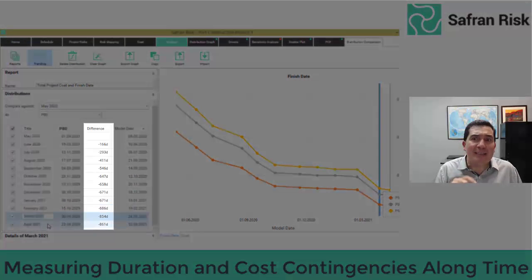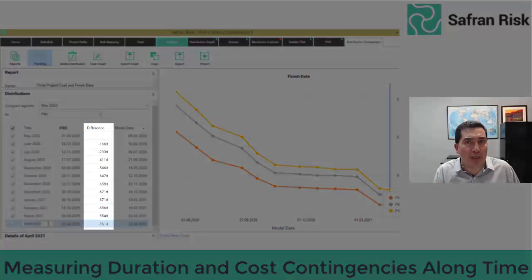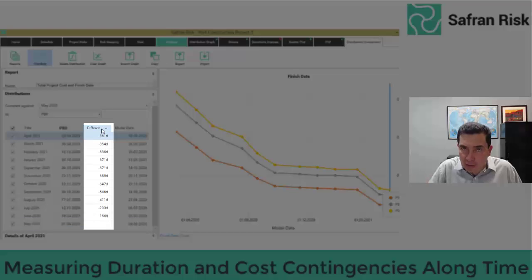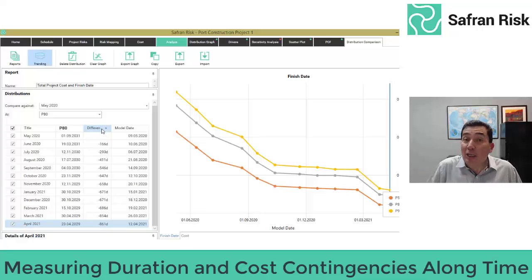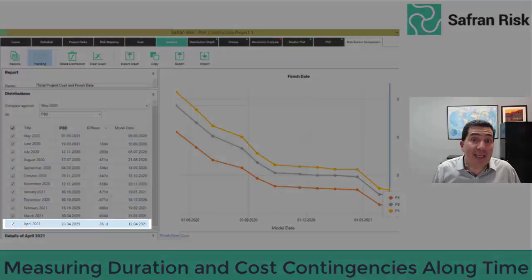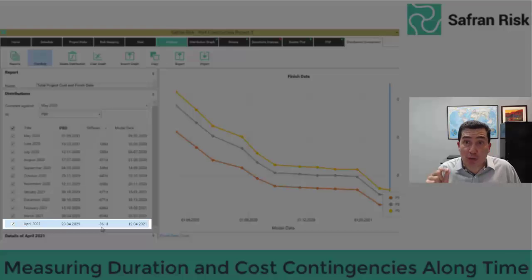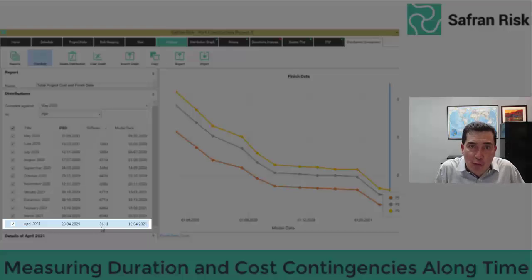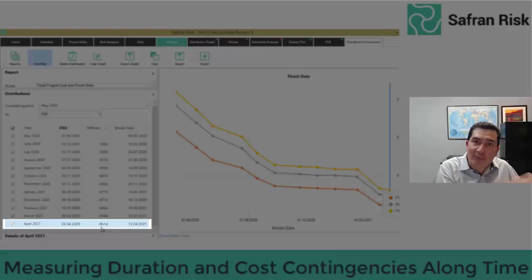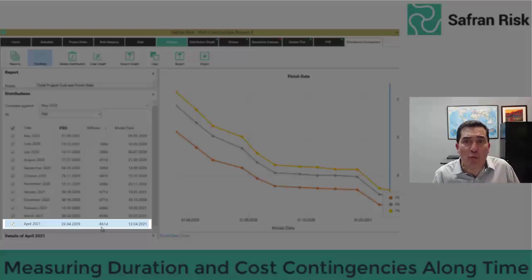Observe the date differences recorded every single month for total project duration. As of April 2021, duration contingency has shortened over 800 days and the 80th percentile of total project delivery date has shrunk from September 2031 to April 2029.